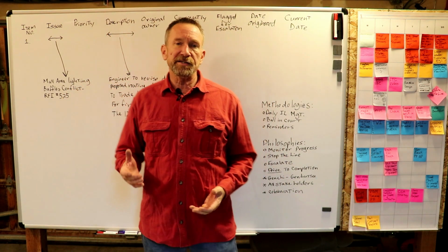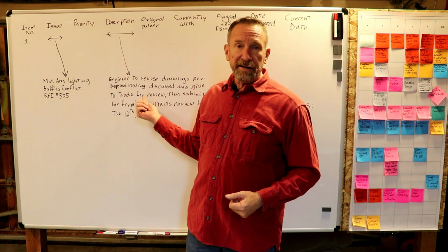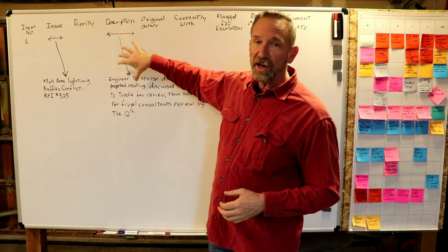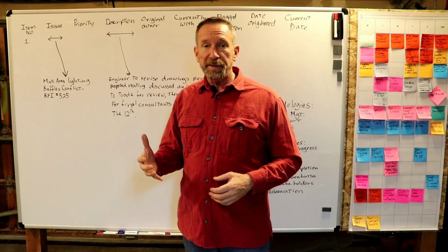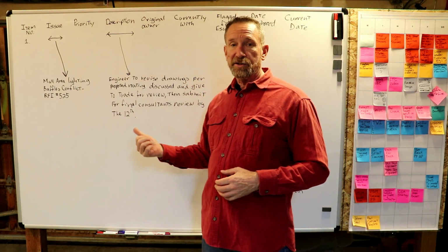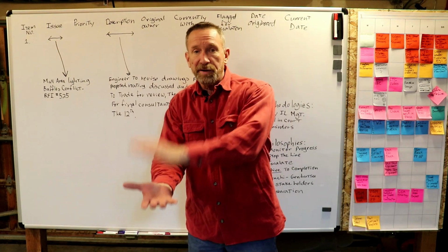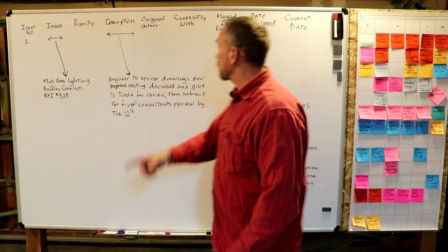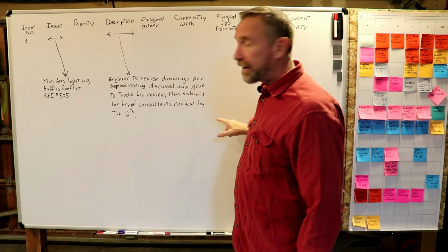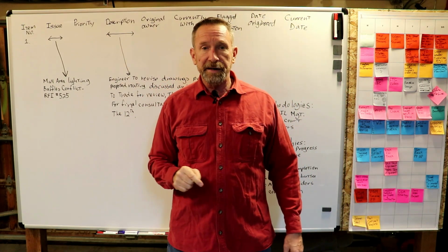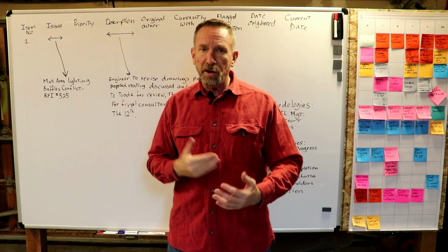So the methodology is, look, as soon as you're done with this step, I already know as the issues log owner what the next step is, and I'm going to make sure that person knows that you're done, make sure that information gets to you, and that you understand what you're to do with that information and you commit to it. I'm going to put that down, and then we're going to get a date that you are committing to get it done. Okay, so that's managing ball in court.